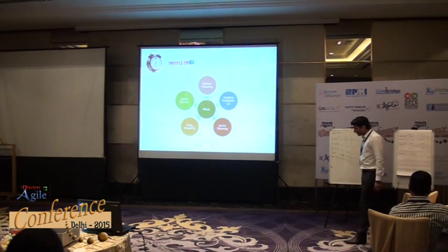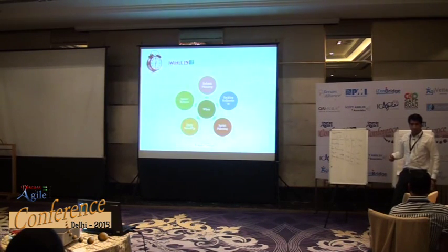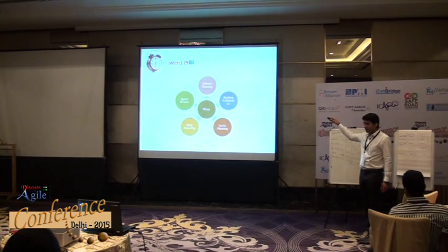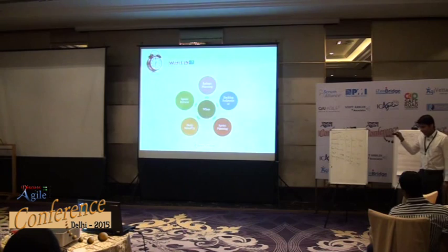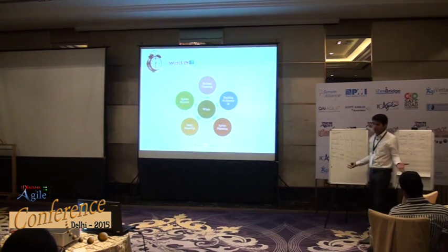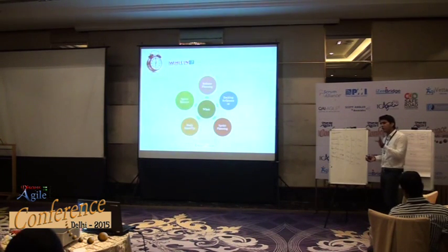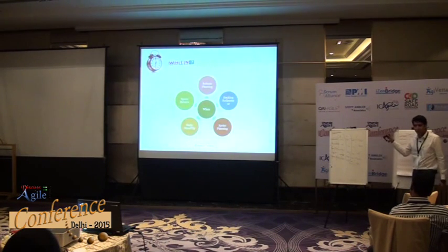Not only creating a risk register helps — as a task, they include it in the product backlog. When I say including it in the product backlog at this level, they might include it as a separate user story, an investigation task, to see if those risks can really be mitigated or reduced, whatever strategy they want to apply. But it's included in the backlog to make sure it does not get missed. Because in Scrum, not much attention or focus is given to handling risk explicitly, so we may miss upon it if we're not including it in the product backlog.